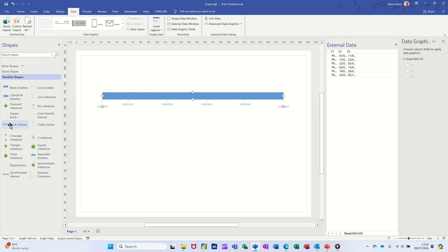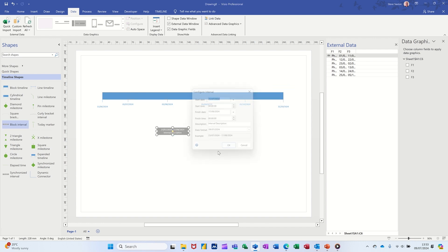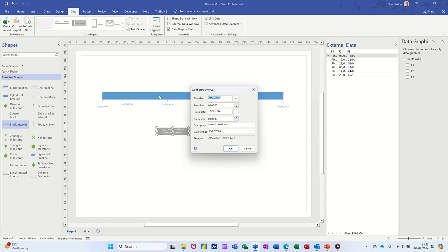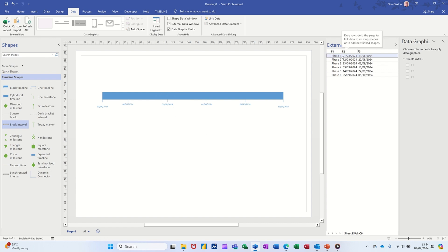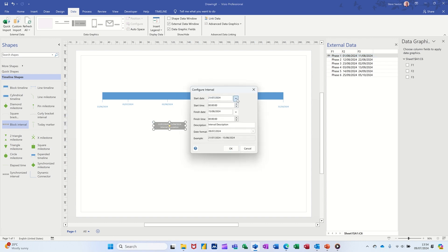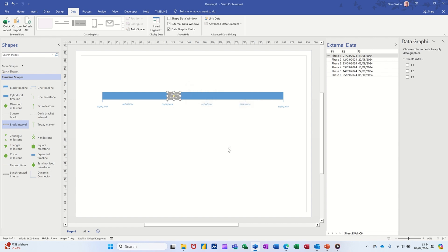Nothing's linked yet — remember it's the shape data. So select what you want to link: block interval. Then drag on the first item. What you have to do for it to sit in the right place is select the dates from up here. That's the first of August to the 11th. Delete the old one and drag it in again so you can see it, then click OK. It sits on the timeline now.